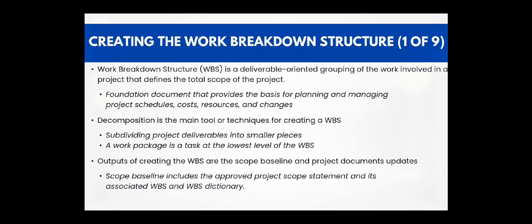In addition to expert judgment, the main tool or technique is decomposition. This is subdividing project deliverables into smaller pieces. The outputs of the process of creating the work breakdown structure are the scope baseline and project documents updates.